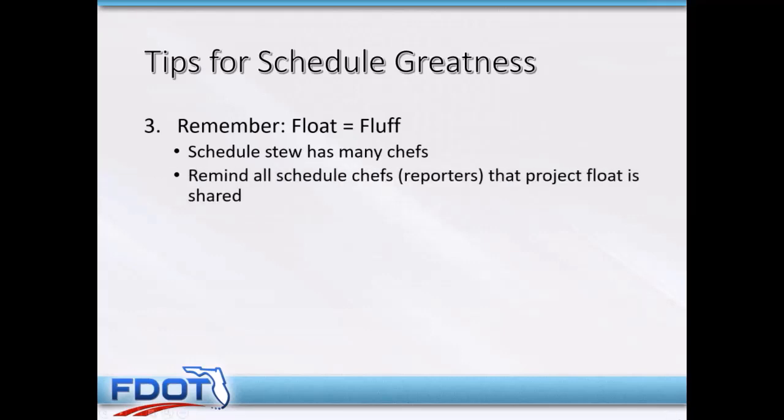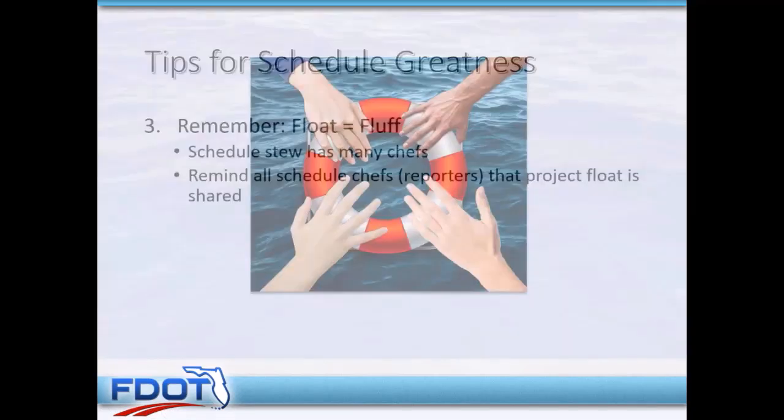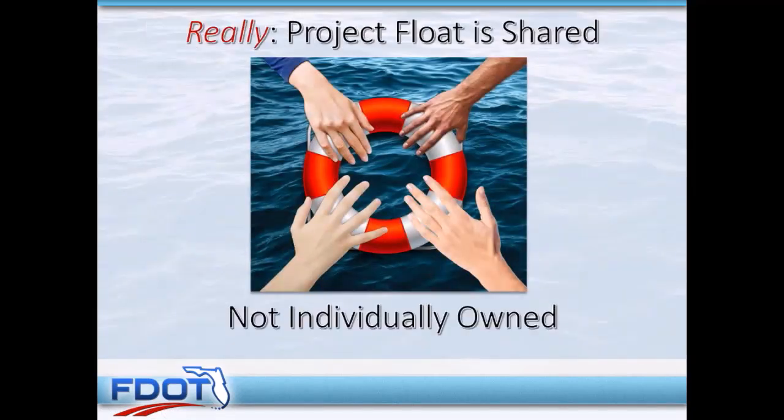And you need to remind all these schedule chefs that the project float is shared. If they see 10 days of positive float on their activity or 20 days or whatever it is, please remind them that that's the pool for everybody. They don't each have 10 days, so they don't want to eat into the positive float.